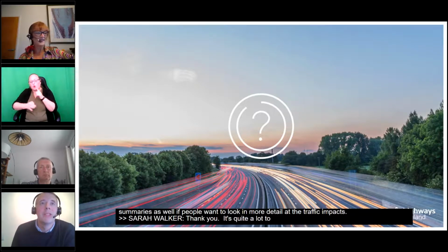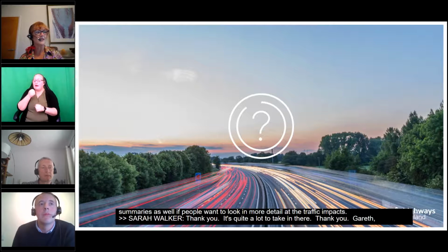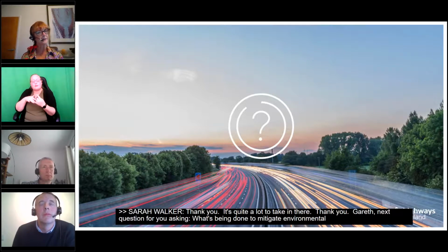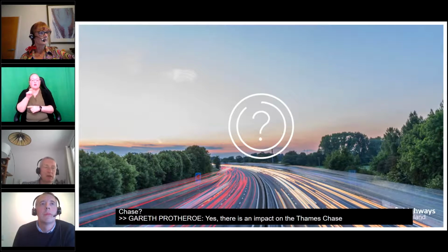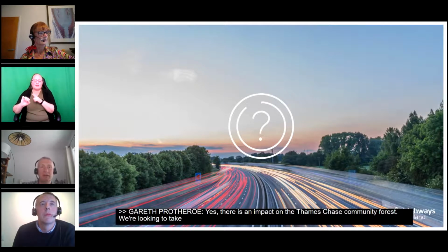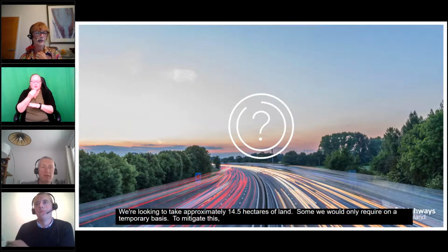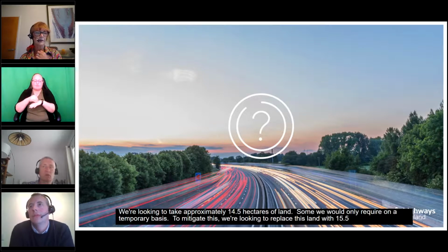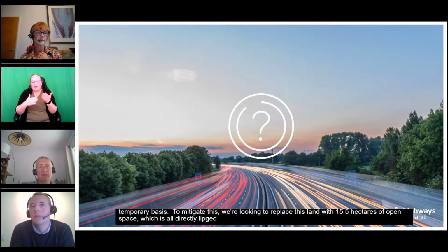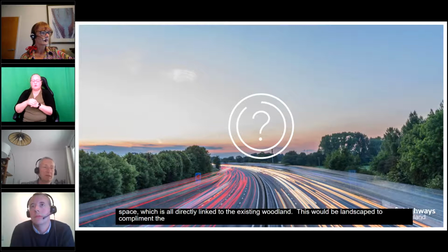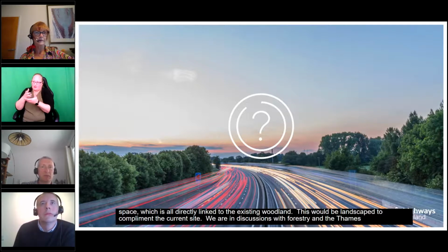Thank you. Gareth, next question for you, asking what's being done to mitigate environmental damage to Thames Chase? Yes, there is an impact on the Thames Chase Community Forest. We're looking to take approximately 14.5 hectares of land. Some we'd only require on a temporary basis. To mitigate this, we're looking to replace this land with 15.5 hectares of open space, which is all directly linked to the existing woodland. This would be landscaped to complement the current site and connect to the existing paths in the area, and we've been in regular discussions with Forestry England and the Thames Chase Trust so that we can work with them to meet the requirements when replacing the land.